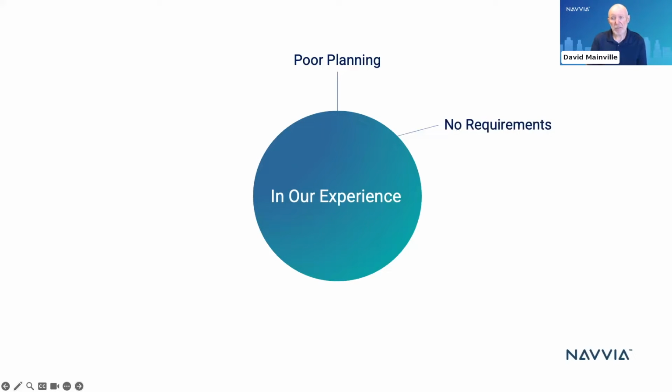No requirements. So when you select a new tool, what are you selecting for? When you're implementing a new tool, do you understand how you want that tool customized to meet the needs of your users? Because a lack of requirements is going to result in something that's not going to meet the needs of the users and result in poor satisfaction.